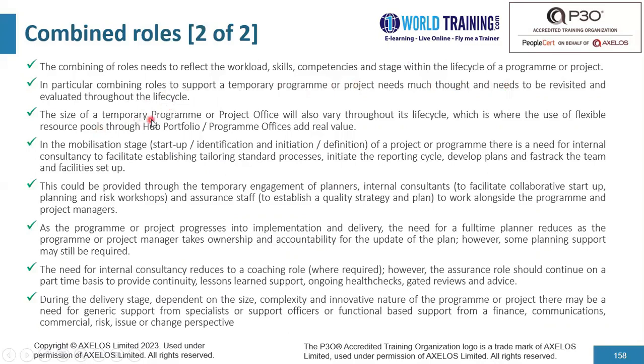The size of a temporary project, program, or project office will also vary throughout its life cycle, which is where the use of flexible resource pools through hub portfolio program offices adds real value. In the mobilization stage, i.e. the startup or the identification or initiation stage of a project or program, there's a need for internal consultancy to facilitate establishing tailored standard processes, initiate the reporting cycle, develop plans, and fast-track the team and facilities setup.